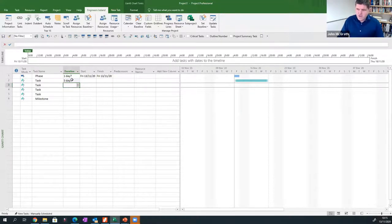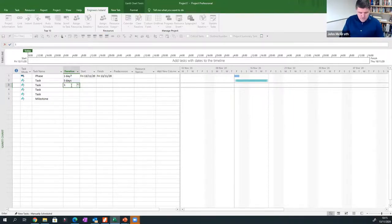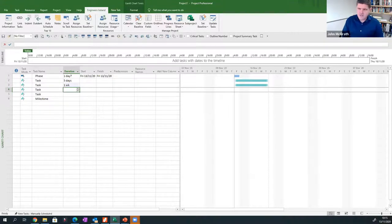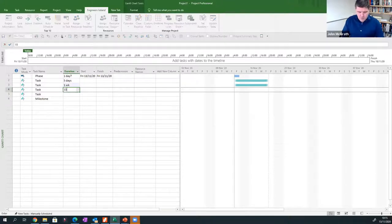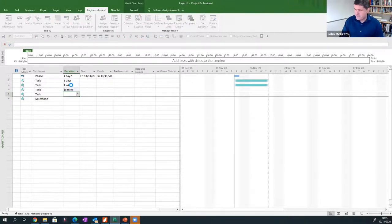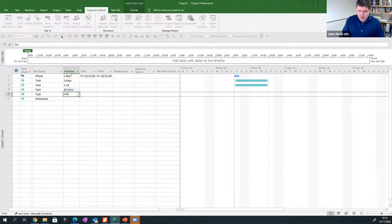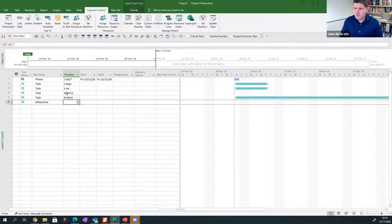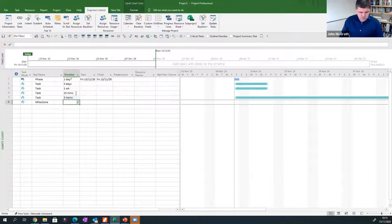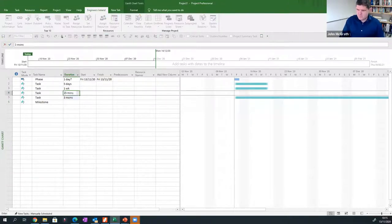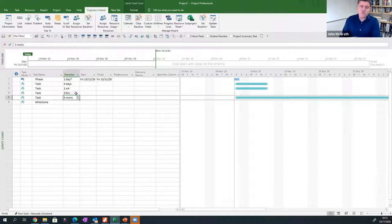You can enter values in multiple ways. I could put in five days, or I could put in '1W' and it plots it as one week — five days and one week are the same value. I can also plan down to a micro level such as 15 minutes, or take a macro view and put in '3MO' to plan three months. The only value I didn't use is hours — I go to 'H' and it puts it in as hours. Those are essentially all the different ways you can enter duration values in Project.